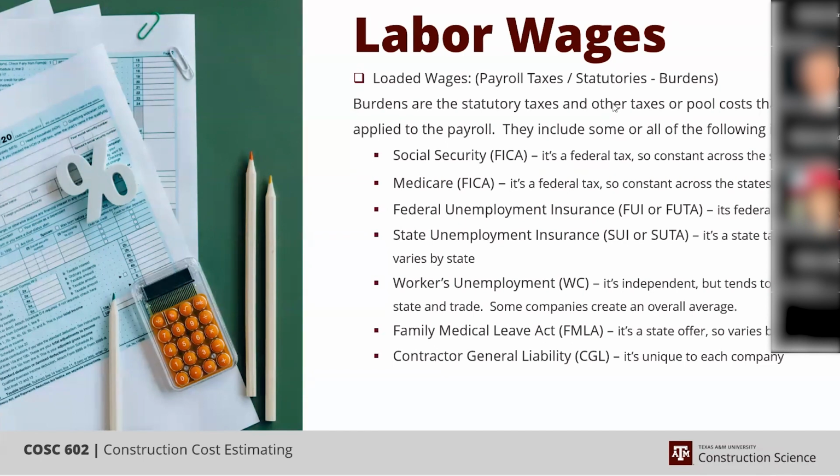That's what the laborer, or the craft, or whoever is earning. That's their pay. But then we have one called base comp, and the base comp includes the multiplier, the PTO, the paid time off, or depending upon the company, it could be TOPE, time off with pay. When you put that multiplier against there, a lot of companies are 10 to 15%. So let's just say 10%.